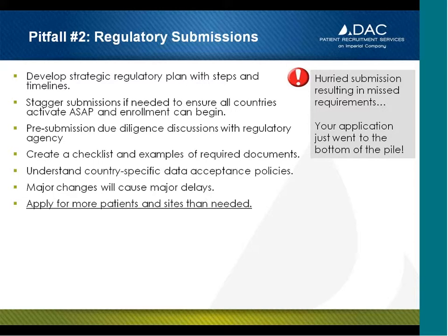So there are a number of best practices which can be followed to try to address this issue. First, really what project is ever successful without a well-thought plan? Developing a strategic regulatory plan with steps and timelines is critical, and it's smart. Things like which countries will you submit your applications in first? How long will the review process take? What about ethics committee review? What is that process like, and how long will that take?